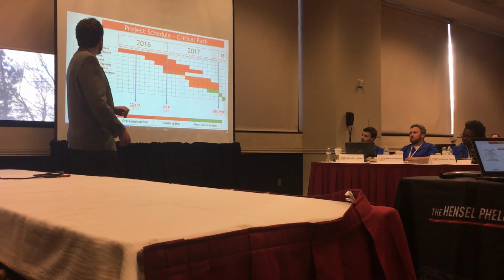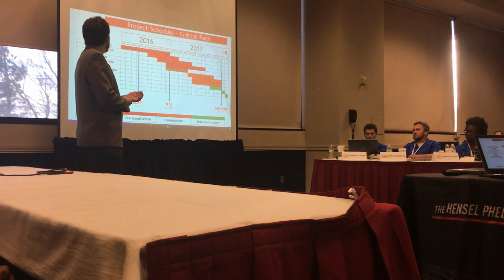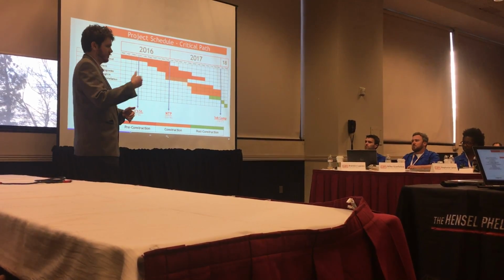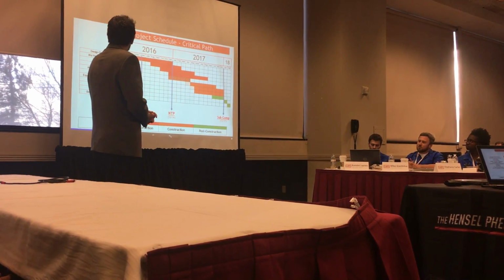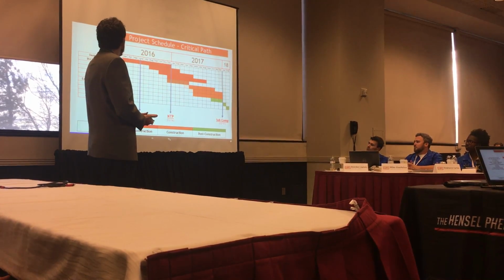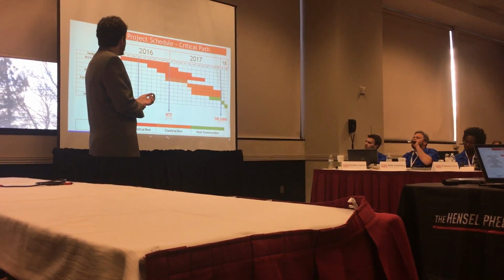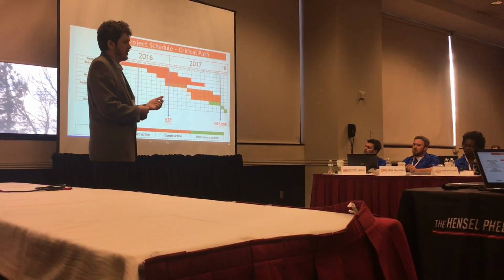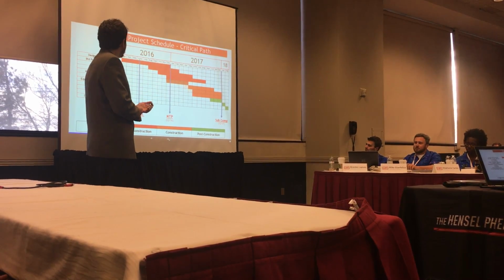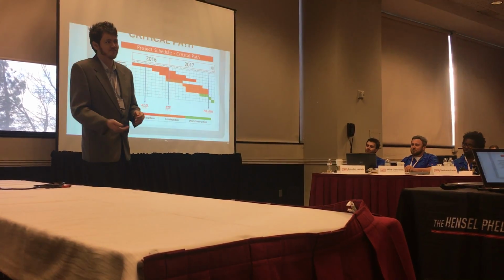Once we completely finish the structural upgrades, we move on to the framing and rough-in and the equipment and system installation, a sort of rolling construction going up from floor to floor. And finally, the finishes. The punch list is also included in this construction phase that leads us into our final commissioning and owner training for our post-construction phase. I will now hand it off to our superintendent, Vache.